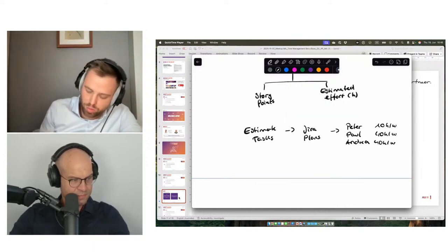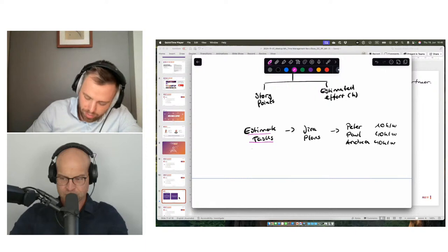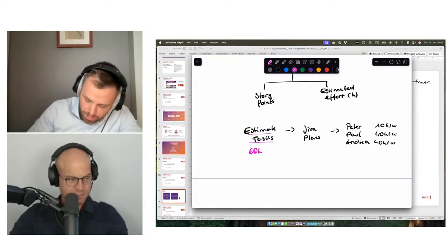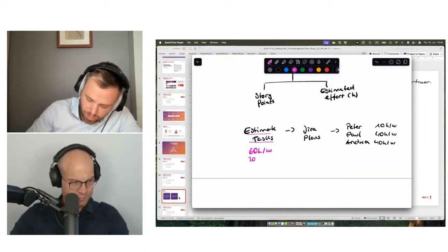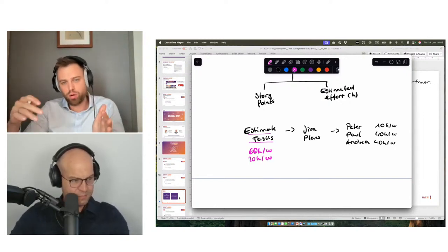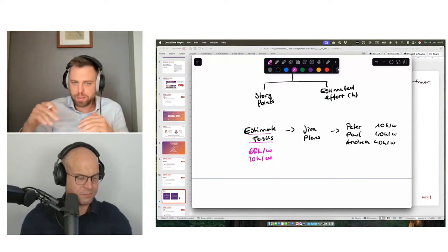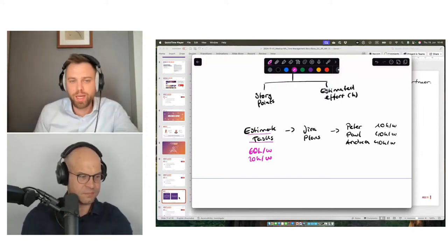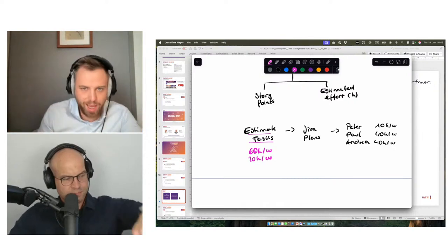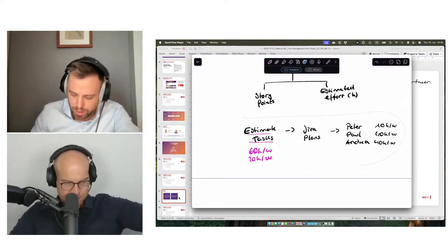And now you look into, okay, what are my estimated tasks here over a certain period of time? For example, you would have for one week 60 hours estimated, and the other week you only have 20 hours estimated. And this is shown in Jira in the form of green and blue, whether you're over capacity, under capacity, or within the capacity. It's not a super sophisticated capacity management, but it's definitely a possibility and an indication.